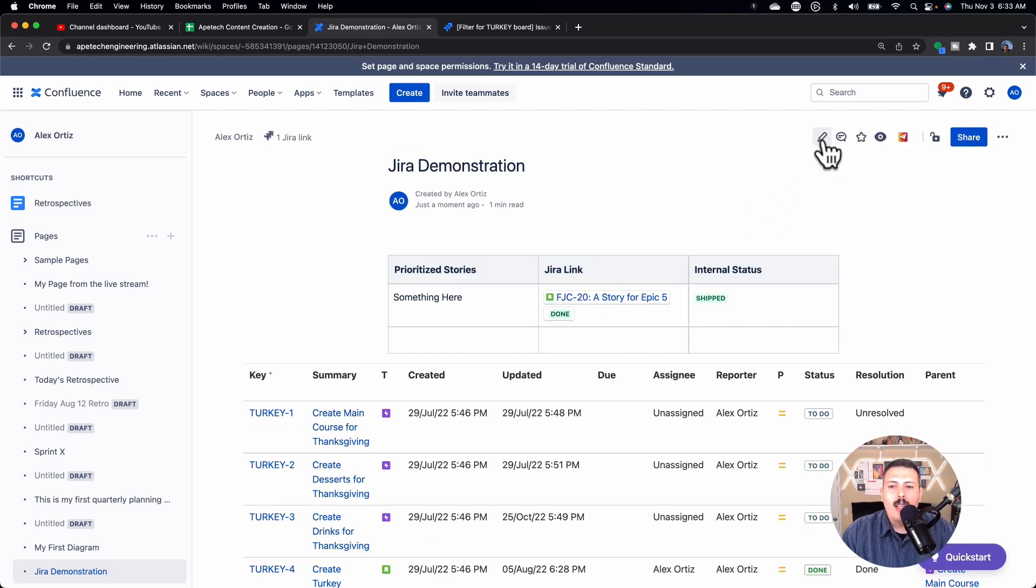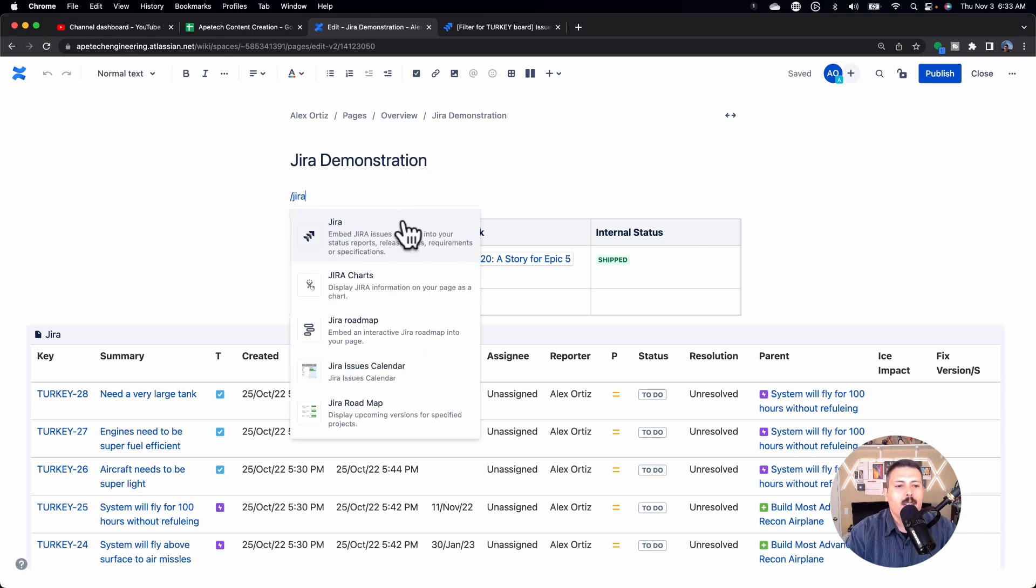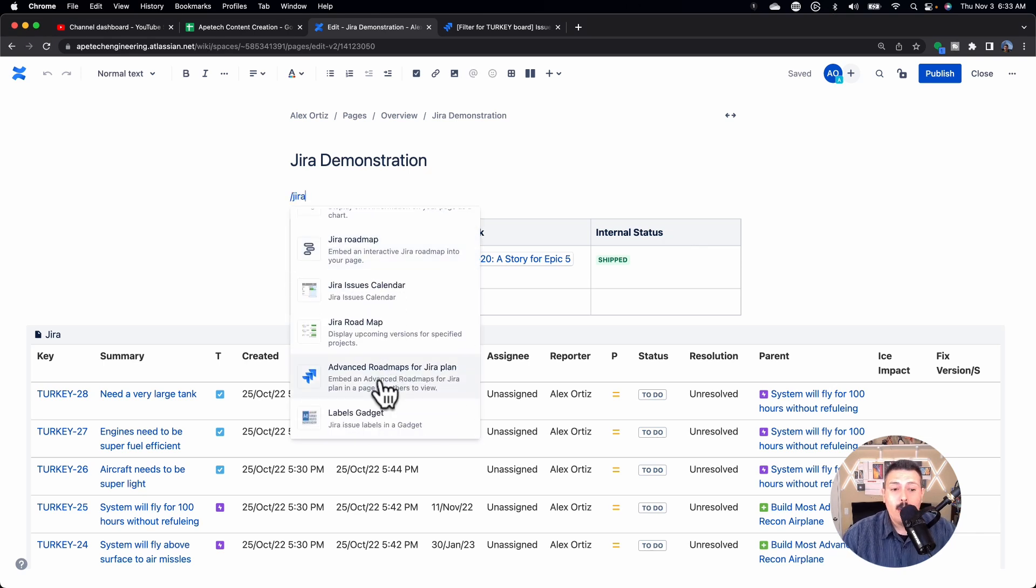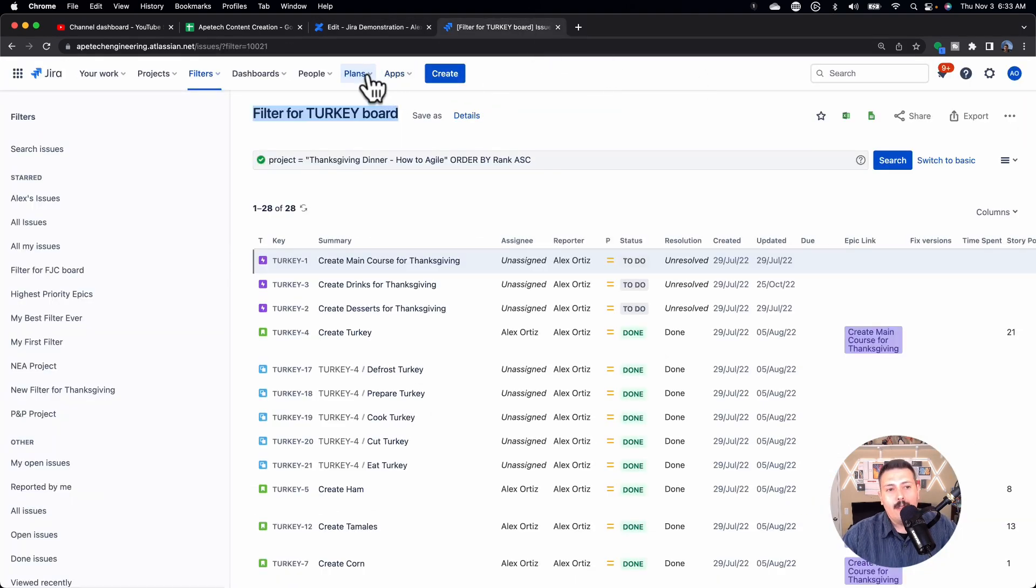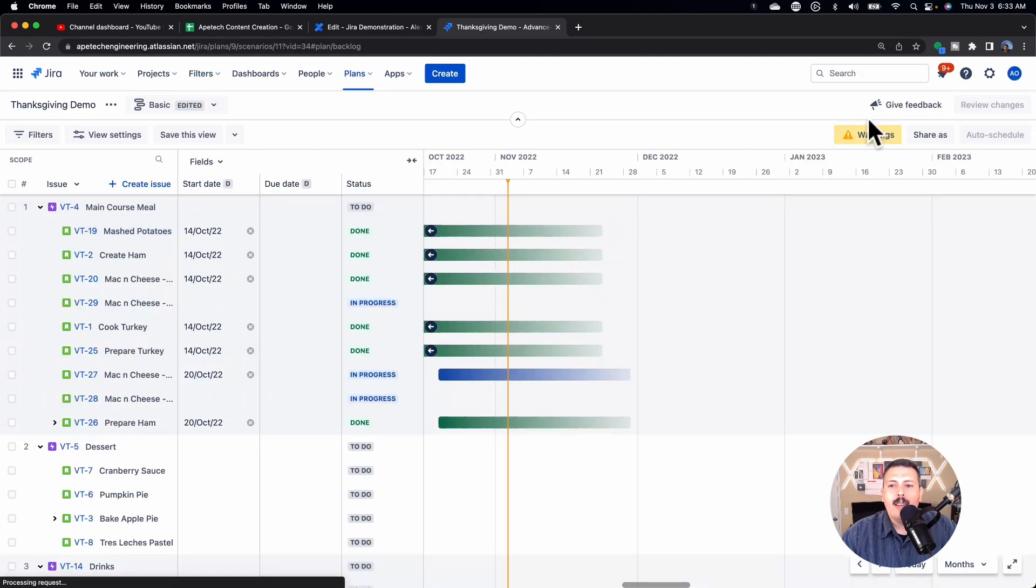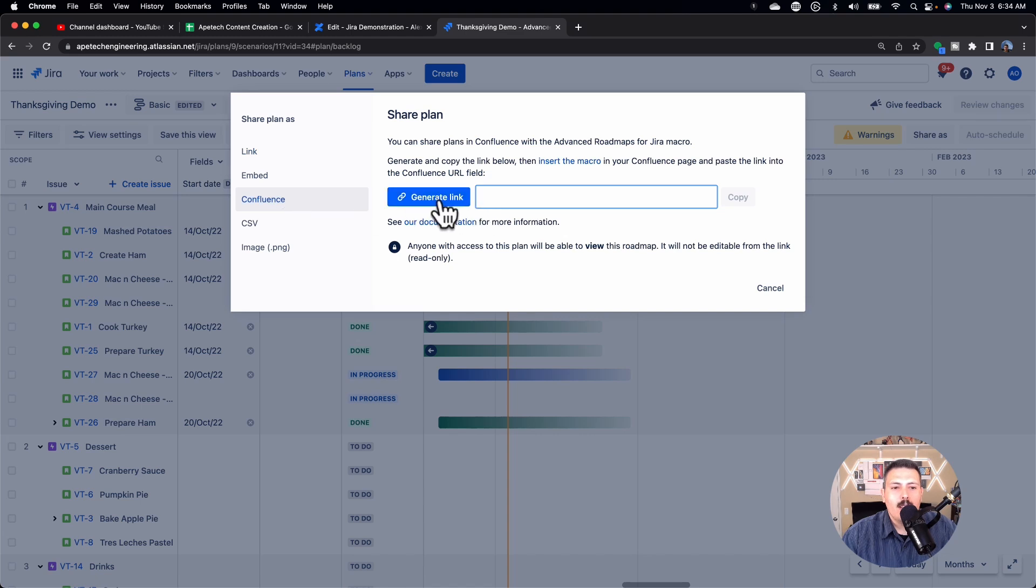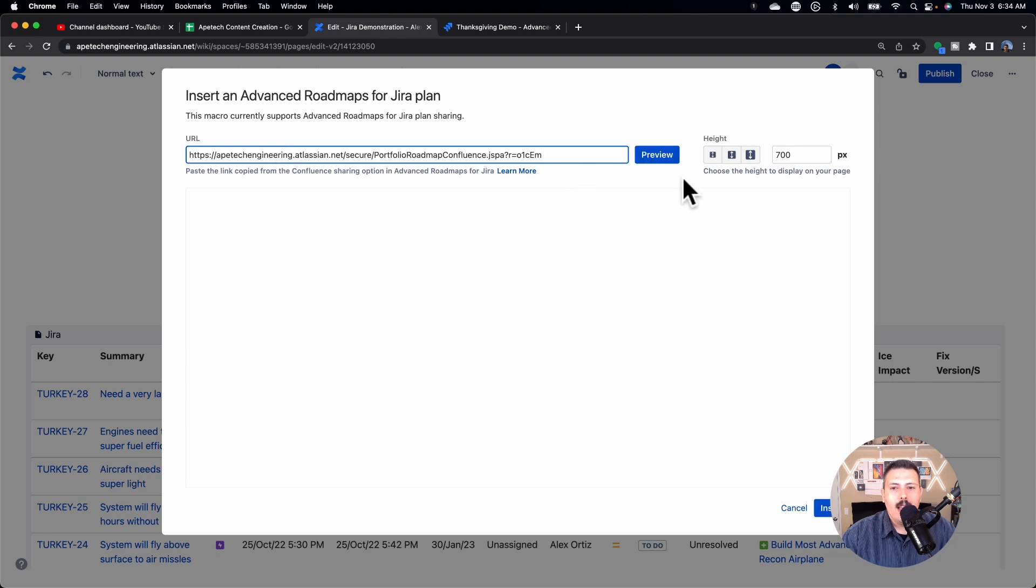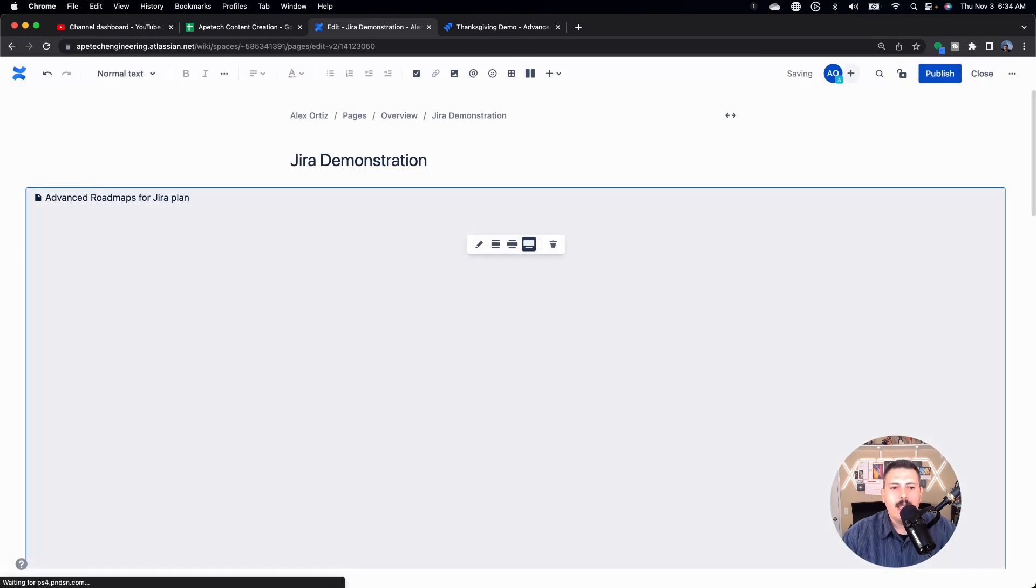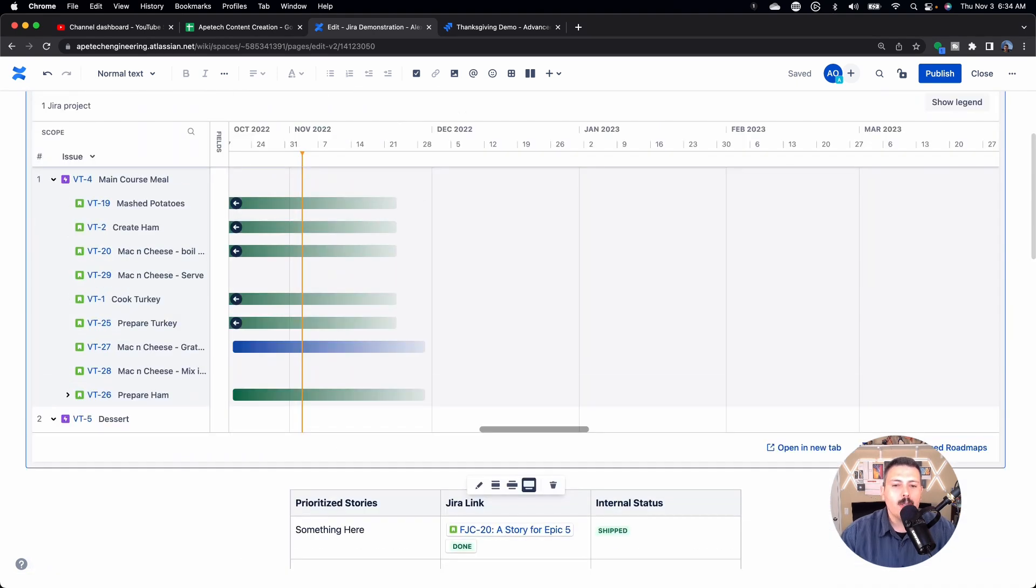The other example that I'll bring you, I'm going to go back into edit. We'll type in Jira again. So this time I'm going to bring in an advanced roadmap. If you're on the premium version of Jira, you can go and bring your advanced roadmap. You do need to go to that advanced roadmap, go to whatever roadmap you have. And then there's a share as button up here. If you go to Confluence, this will generate the link. You can click copy on that. And then back in Confluence, you can paste it in and then you can preview it if you want to, or you can just hit insert and that'll bring in the advanced roadmap. So those are three cool things that you can do, but it doesn't end there.